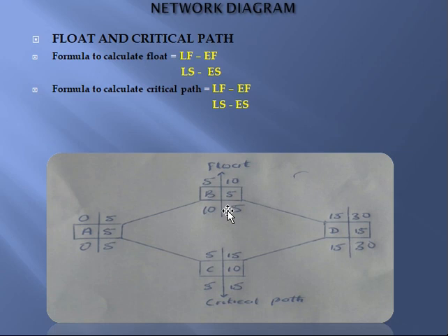That is to say, remember we said that since activity D is dependent on B and C, for D to start has to be on the 15th. You understand? Whereas here for B, the project is ending on the 10th. Now, if this activity starts on the 5th and ends on the 10th, you cannot start activity D. Understand? Why? Because it is dependent on activity C, which is ending on the 15th.